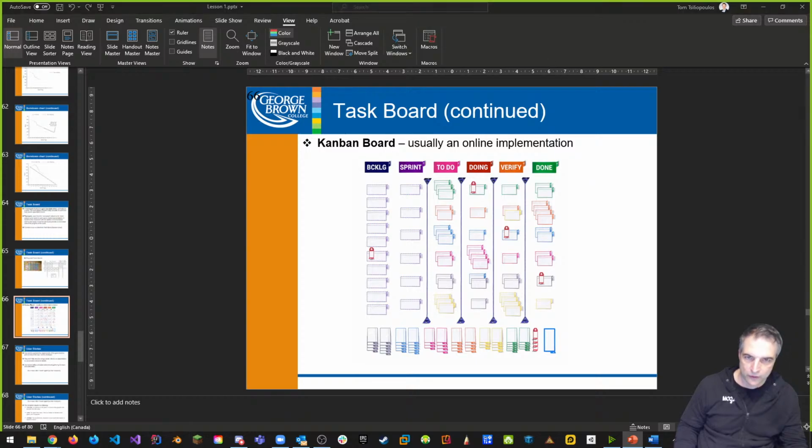All right, so you might have backlog. That's a column. And then we have our sprint. So our sprint takes items from the backlog and puts them in the sprint, the features we want to complete from the backlog. We have a to-do. These are things that maybe we want to do, and this could be we want to do today. Typically, the to-do column and the sprint column, for us, we would merge together.